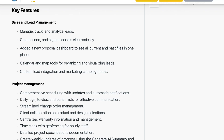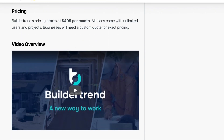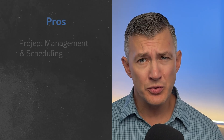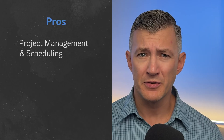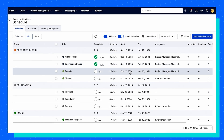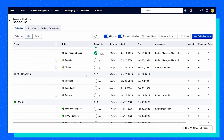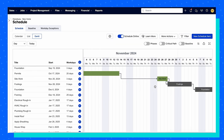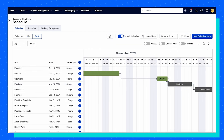But this also came with an increase in price, which has gotten some attention from long-time customers. Starting with what Buildertrend does well: its project management and scheduling tools are the backbone of the system and the best feature. I really like how you can draft templates and save them for repeat projects — just build one schedule once, and the next time you have a complex project, you can tweak any changes from the previous job.